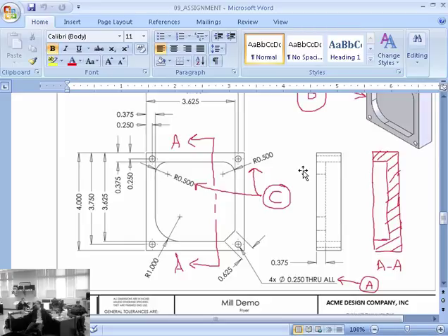Why wouldn't you want to tell somebody if you're a bidding company? You make more money on change orders. That's exactly right. Especially if it's a government operation, whoever submits the drawings actually gets to do change orders later on. They'll bid the work straight up, and once they start the work, they'll say, oh, wait a minute, you all made a mistake. We're going to have to do a change order on this.